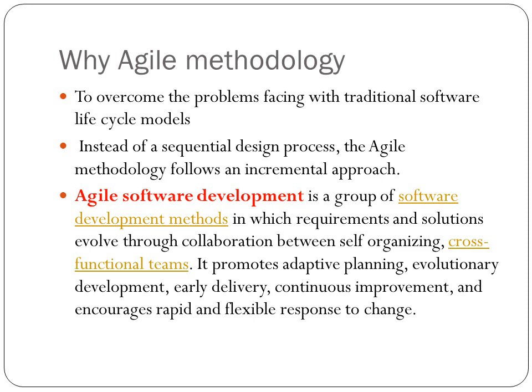For example, in the waterfall model, we start off with the design phase and then we move on to coding once the design phase is completed. But when you have moved on to the coding phase, there is no chance that you can get back to the design phase as it follows a linear approach. In contrast, Agile methodology uses an incremental approach.